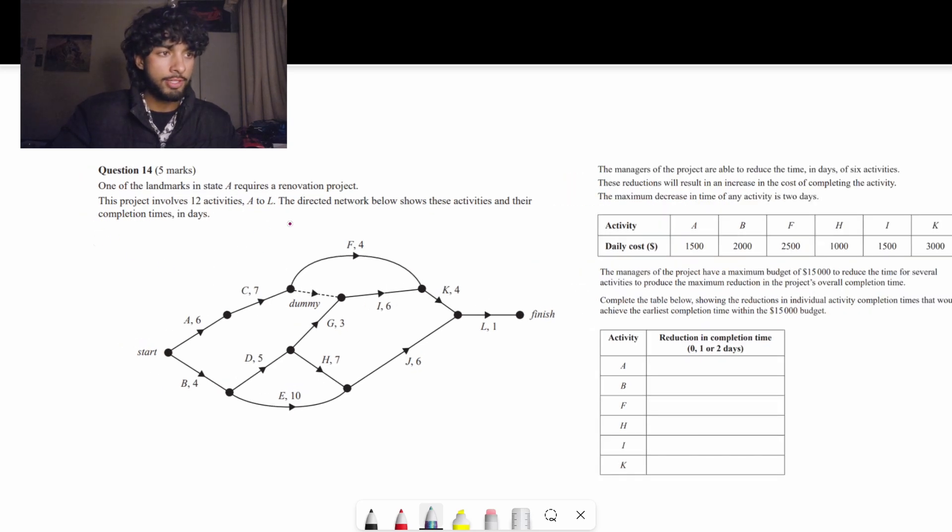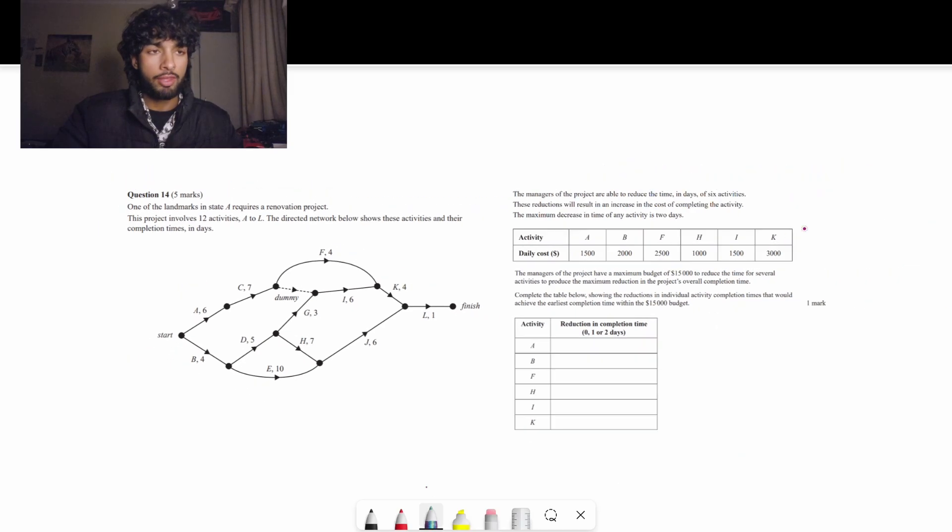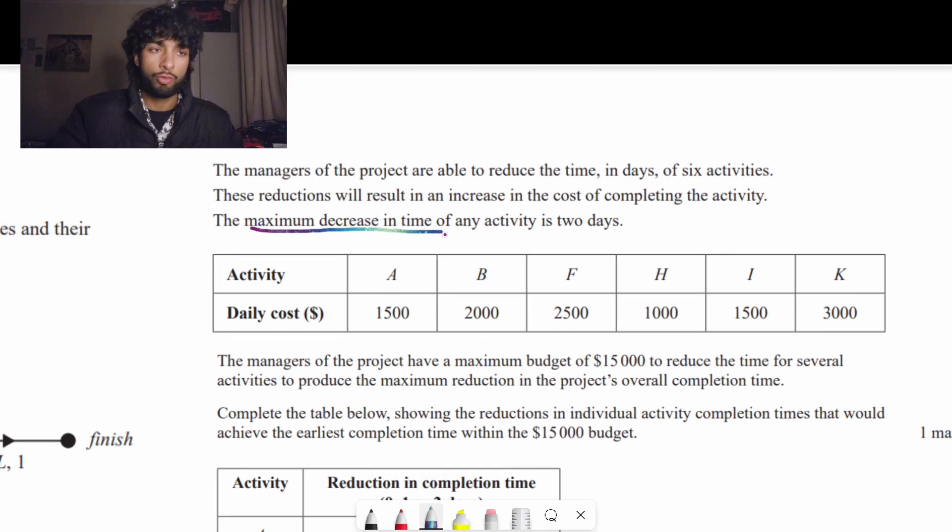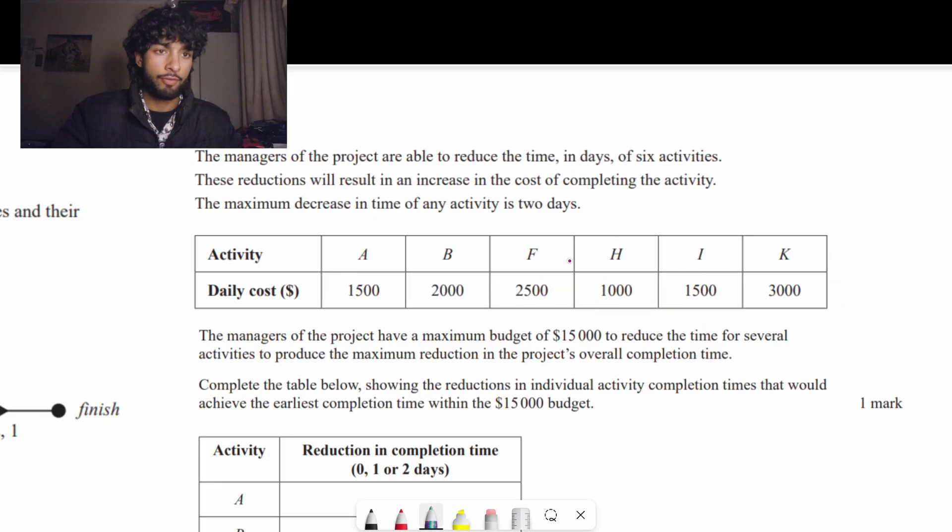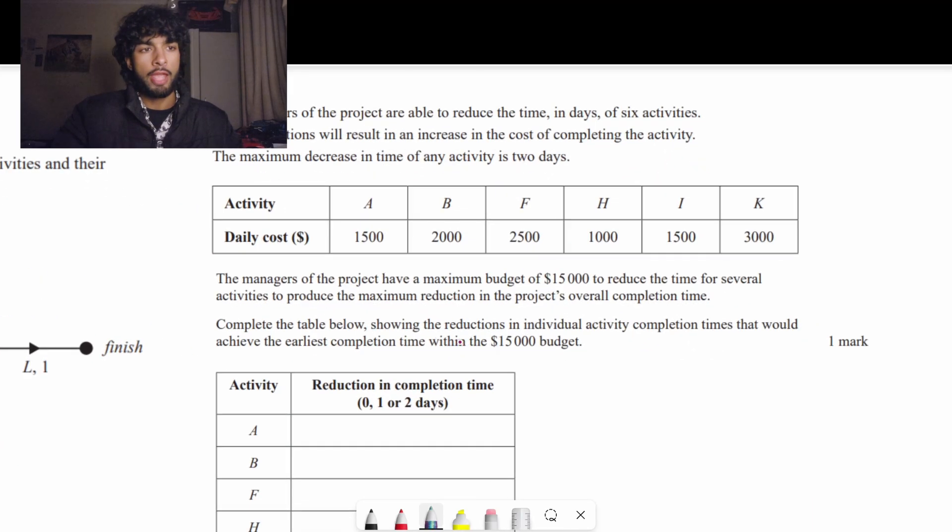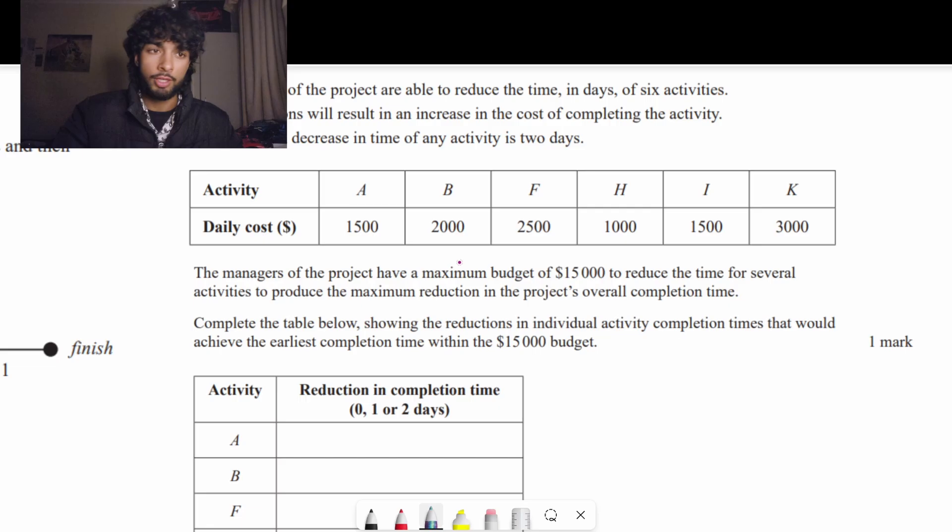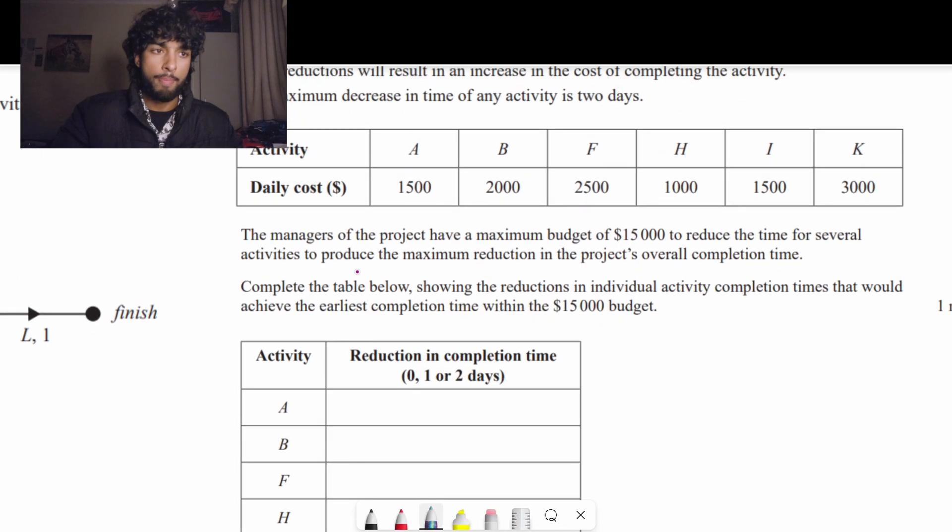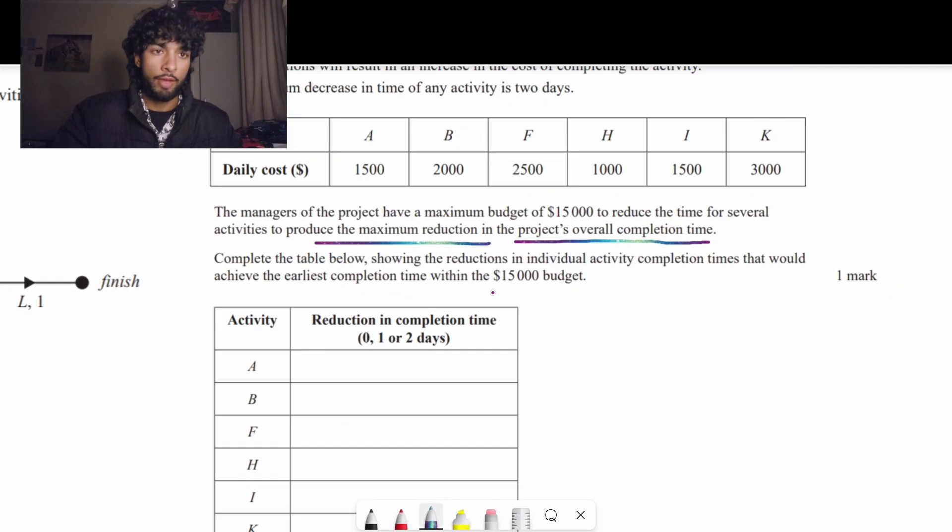There are 12 activities in this network and the manager of this project can reduce the time of six of these activities and the maximum they can decrease a certain activity is two days. These are all the activities and they have different costs as you can see and they have a maximum budget of $15,000 to reduce the time for several activities.